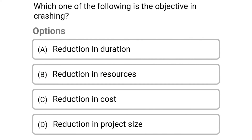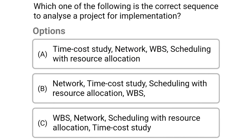Next question: which one of the following is the objective in crashing? Option A: reduction in duration, option B: reduction in resources, option C: reduction in cost, option D: reduction in project size. The correct answer is option A: reduction in duration.